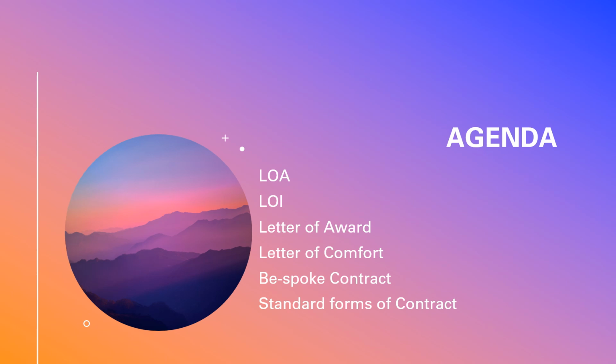So there are two types of LOA we will issue. One is very simple, two or three pages in which you write the contractor name, employer name, scope, how much is the amount, and what was the basis of the LOA, like tender, at this reference, PTC, TE, all those things. On the other hand, you can also issue a LOA by including all these documents. You will include the specification, BOQ, a full set of drawings, sometimes a list of drawings, exceptions, exclusions, PA, TQ, PTC, everything can be included. So that is the formal letter.